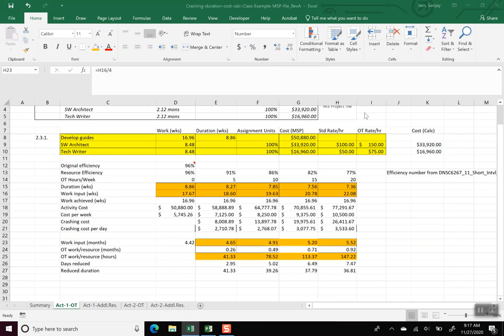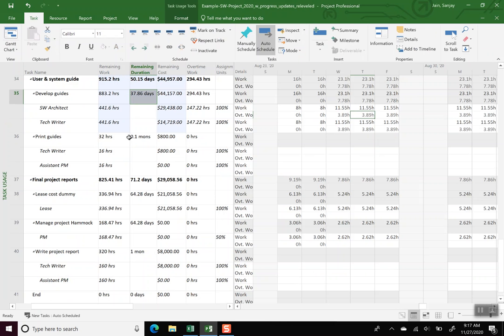So let's go back and see the duration we were expecting to see was 36.81. And so if we come back here, put that 36.81, oops, it's not taking it here, 36.81 days. And so you see, once we put that number, now we are getting our expected 4 hours a day overtime that we are allowing. So in this case, only in this case, because the activity was in progress and our variances modified some of the numbers, we are actually overriding what was the duration calculated by Microsoft Project.